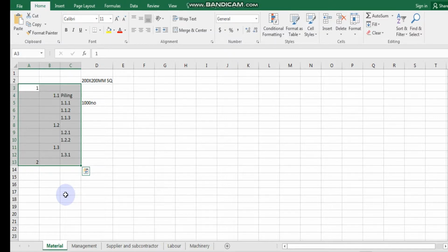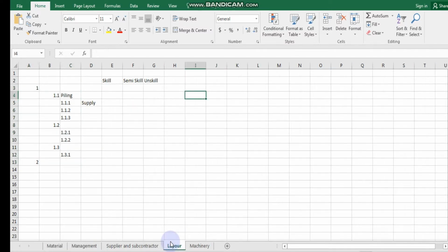and after that you will do allocation. The role here will basically be the allocation of the resources that are available to you, and then you will tick it, or you can put the numbers there. If you tick it, it is enough. Let's say if I put labor, tradesman, I can put carpenter, but if you need two, you put two. So then it's going to be matched with whatever you have in your resources data sheet.